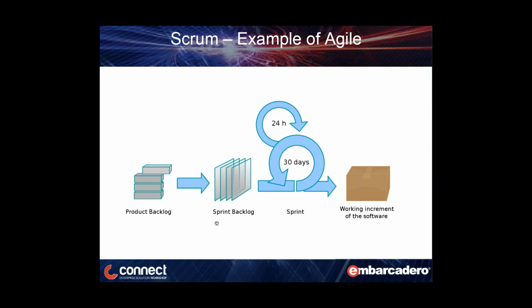How you construct this backlog and this sprint backlog is important, because we don't just want the end user or the product owner to say, I want these 10 features done. We need to understand what the capabilities of the development team are. And this is where the idea of repeatability through mini recipes comes through. The first couple of sprints that you do are probably going to be horrendous because you're still trying to find your feet as a development team and understand what you can actually develop in those 30 days. So estimates might be out the window, but because you can repeat the processes and you're capturing how long things take, you'll get a better idea of what you're capable of doing.